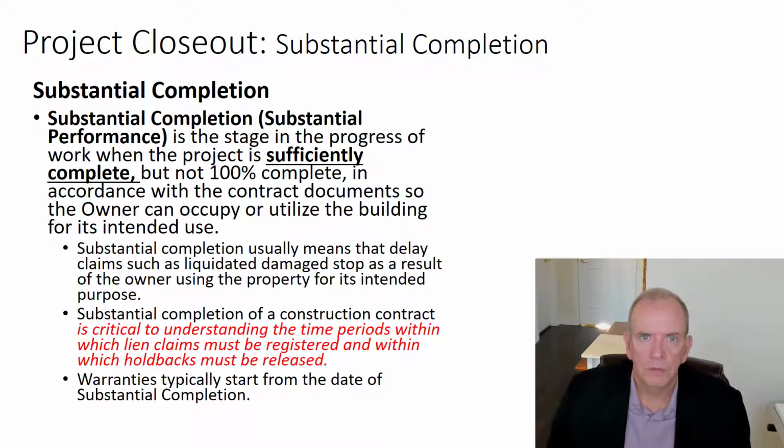So I might not be willing to give substantial completion in that case because I can't run the classes the way I would want to, or the Wi-Fi systems and the projection units aren't working properly. You can probably get occupancy, but not substantial completion in that case. So that's giving you sort of a sense of the difference with it.